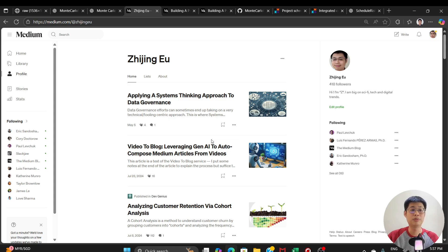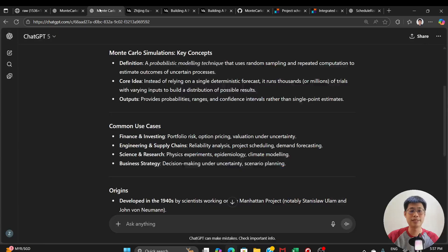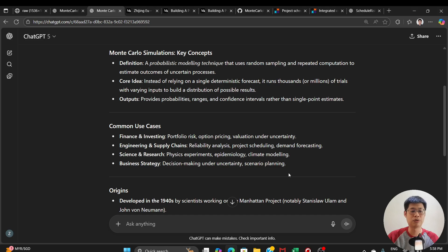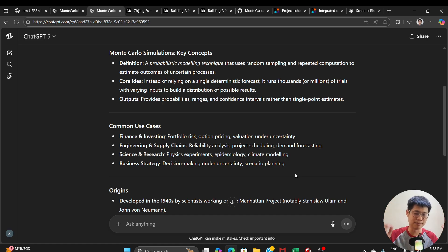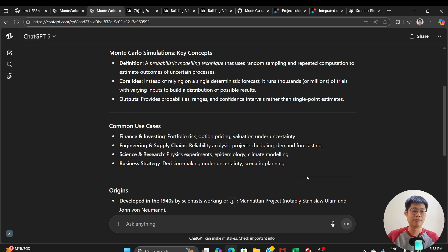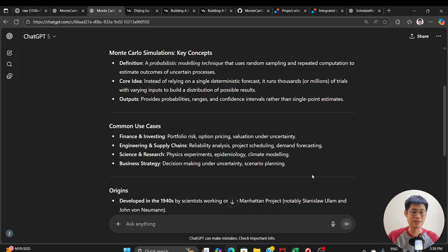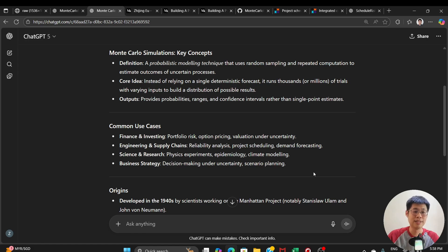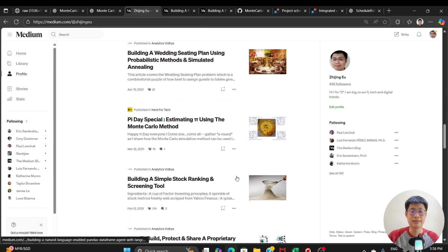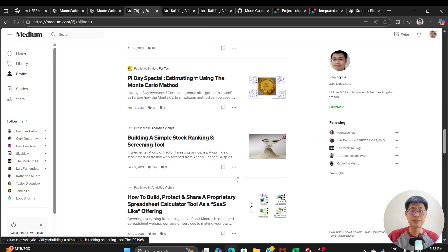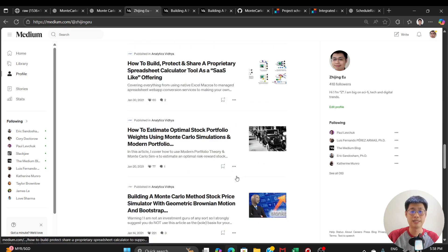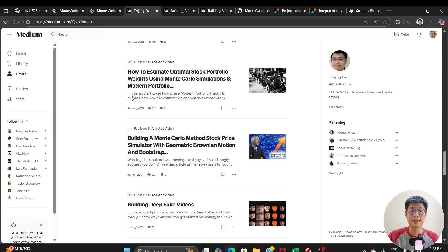And if you're not familiar with Monte Carlo as a concept, it is a simulation technique that you can use for modeling. So typically when you want to estimate something, you normally give a single number and you add up lots of single numbers. A Monte Carlo simulation is when you can define variability in your inputs. And when you run it multiple times, you get kind of a range of outputs for the total you're interested in. So this is something that has a lot of utility in a wide range of use cases.